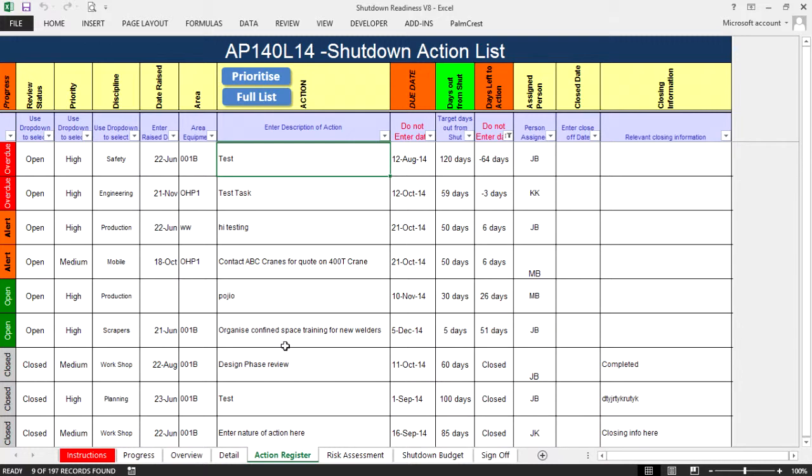The nice thing about the action list is that every time I do a shutdown, I can review the action list, I can update it without having to delete everything. I may only delete 20% and I would add back 20%. Thus I'm not going over the same old stuff every time I plan for a shutdown, every 14 or 16 weeks or whatever the case may be.